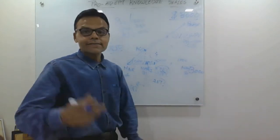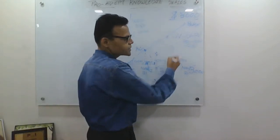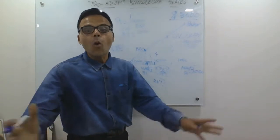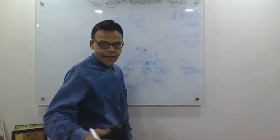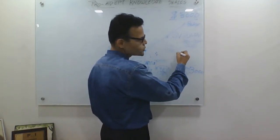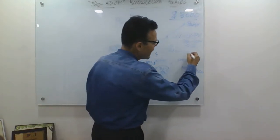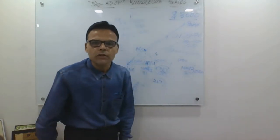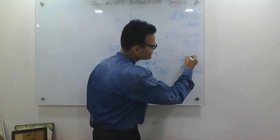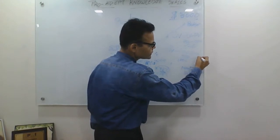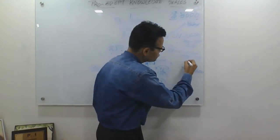Right. The second variance in your project control is cost variance. As I said, you're already over budget. You're screwed up on your money part. So how do we find that variance? Here you go: cost variance is equal to earned value minus actual expenditure or actual cost. In our example this is 750 and actual cost is 1000, so your cost variance is minus 250 again.